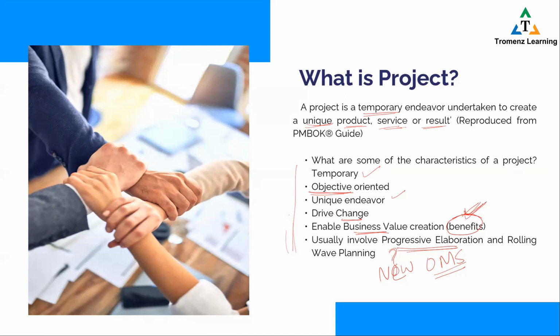Okay, let's start from here. I'm sure you understand the term scope. Every project has a scope. In simplest language, what is scope? Scope is the work that we need to perform, right? So when we start a project on the very first day, we would only have a high level view of the scope, like a bird's eye view. The details are not known. And as we move through the project lifecycle, we keep on detailing out or refining the scope. This is what is progressive elaboration. Not necessarily extending much.